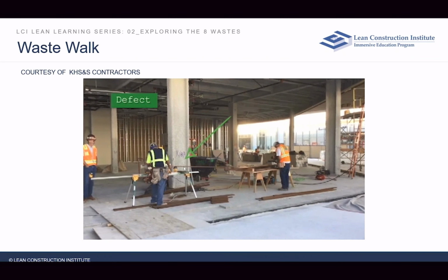Now we got this thing. When you watch the video, he actually moves the whole sawhorse over, because as he was cutting, he was going to hit this column that has finished work on it. This is a fireproof column. It has finished work, and he was going to bang into it. And it looks like there's actually a mark next to where the letters are, like a piece was banged on that column that somebody's going to have to go back and now repair or replace. So we created a defect for somebody else to come fix, because our work site has not been managed properly.